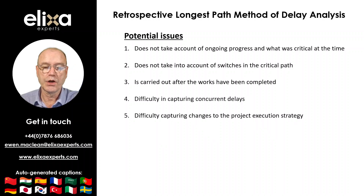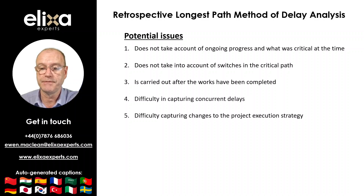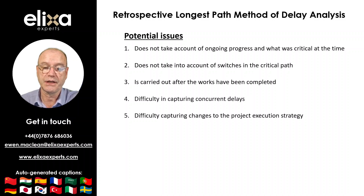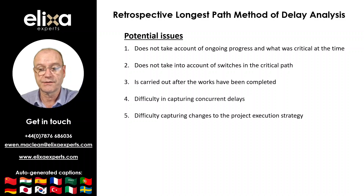If the works are resequenced or re-baselined during the works, then the retrospective longest path method of analysis may not adequately capture changes in the project execution strategy at the time. This can potentially lead to an inaccurate assessment of the critical path and delay to the project by not taking account of changes in the critical path at the time, since the retrospective longest path is identified solely at the end of the project.